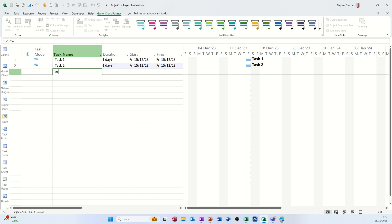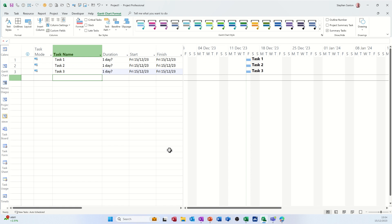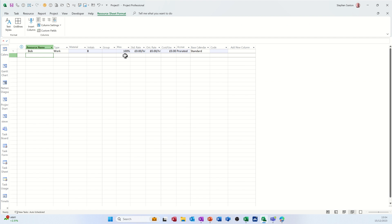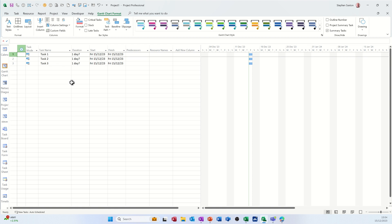I'll create one resource. Go into the resource sheet. Call it Bob, and let's put him on 10 pounds an hour like so.